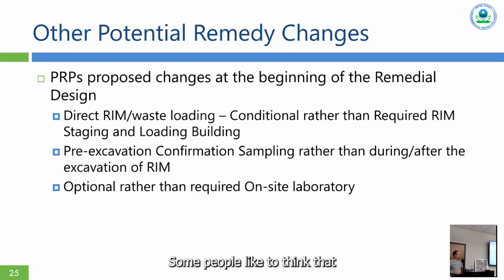I know there's some misunderstanding. Some people in the public think that building is a good thing because it keeps stuff contained. But really, it's being trucked across the site and disposed of and moved several times. The only reason that building was there was because it was going to be handled multiple times and sitting out for a longer time period. So the building really was not a benefit to protecting the community. If those operations were needed, fine, but if it's not necessary, it's better to not use that building.